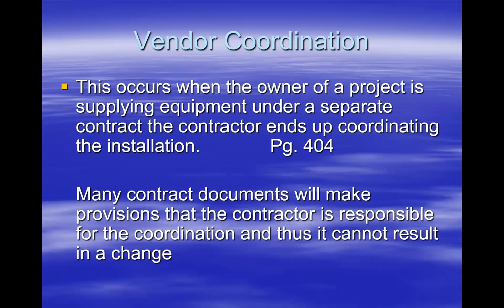We will supply, and we would like you to take care of all the coordination. Then that would be an example of when you might have a change order. I have had that happen on projects. I think what happens is the owners are like, hey, we can do this, we can save some money, and then it turns out that it's a little bit more difficult than they realized.